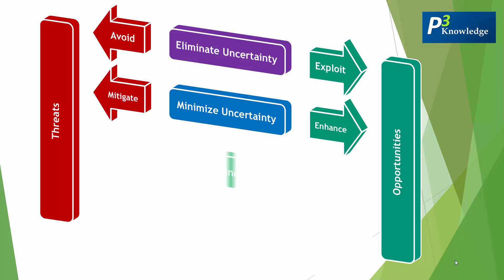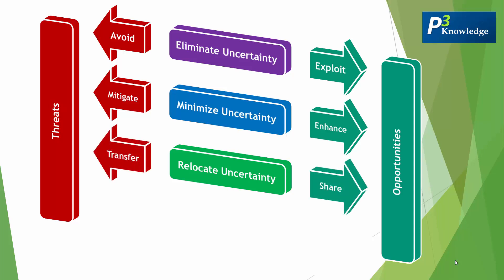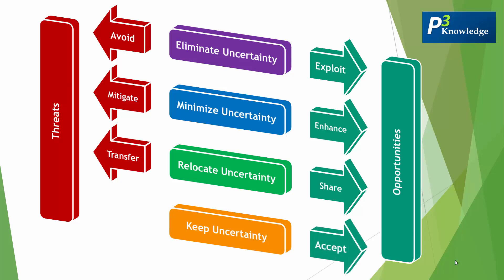The third principle is to relocate uncertainty — trying to put part or all of the risk onto a third party. In the case of positive risk, we call it share, and in the case of a threat, we call it transfer. Share means you join with a third party, while transfer means you give it away for them to take responsibility. The fourth principle is to keep uncertainty — leave it as it is. In the case of opportunities, it's called accept, and the same goes for threats — also called accept.